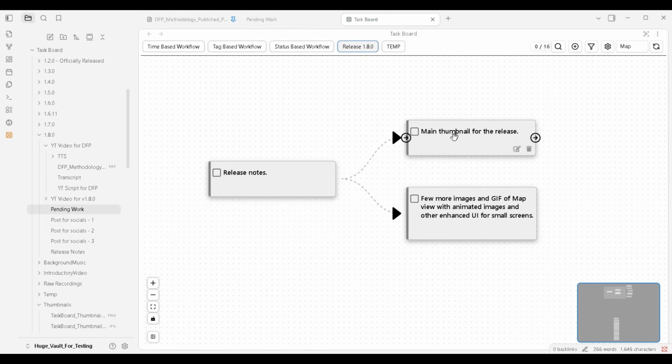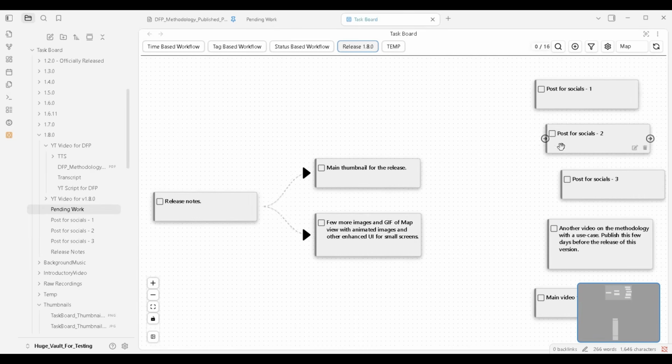Now, I have found the parent tasks here, as you can see, and I have also connected them to the child task I have here. Similarly, I have to repeat this same process to find the higher levels of parent tasks. So now, let me find if there are second level parent tasks and also if there are third level parent tasks and so on.